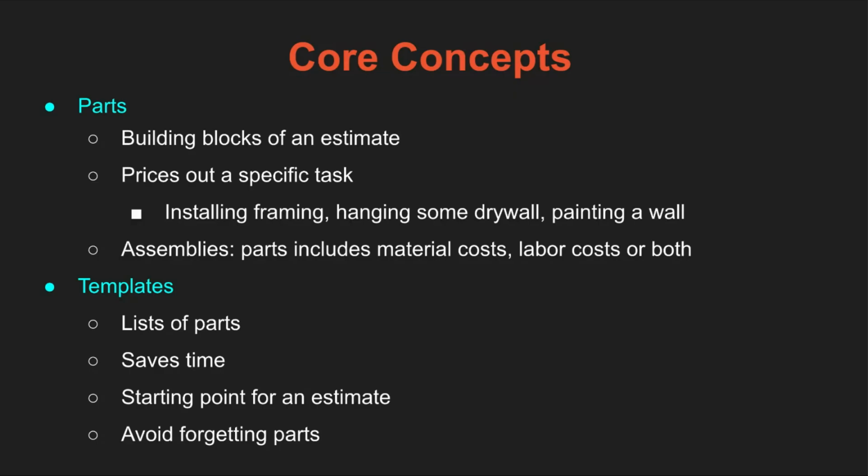Now, this cost data is locally sourced from the area you input when you sign up. We survey a wide variety of suppliers to come up with average unit costs for each area. So it doesn't come from any one specific supplier, more like an aggregate across all suppliers in your region. You can adjust your location anytime if you need to estimate in different cities or states, and I'm going to show you how to do that here in a little bit.